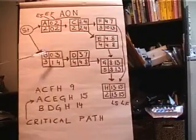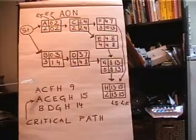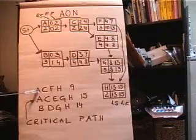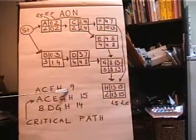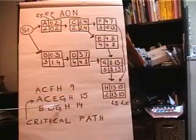So what we'd first like to do is figure out where the critical path is. It turns out that the critical path is the longest path through the network. So if we enumerate all the possible paths: A, C, F, and H add up the times, we get 9. A, C, E, G, and H add up those times, we get 15.